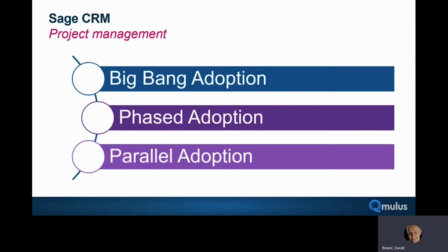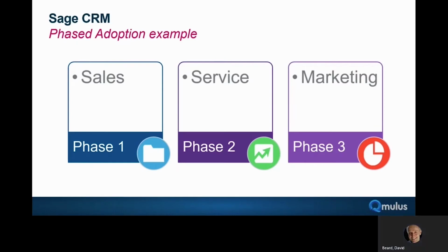So how should you put in CRM? Should you go all out and do everything at once? Should you phase it? My recommendation is always that you phase it. Why? Because there's a risk element you could immediately dial down by doing small chunks quickly and one after the other, rather than big bang. Big bang is inherently riskier. There are more people involved, there are more moving parts, there are more things that are hoping to be done by date X, and there's more risk that something will drop and impact something else.